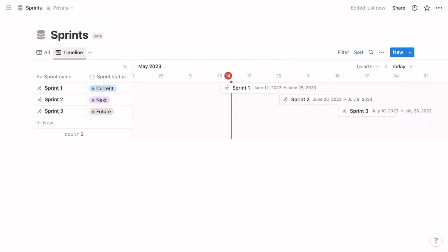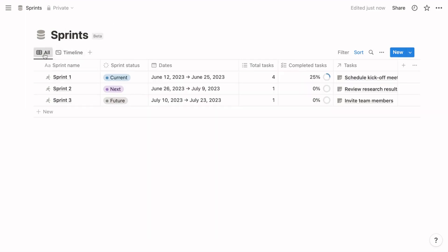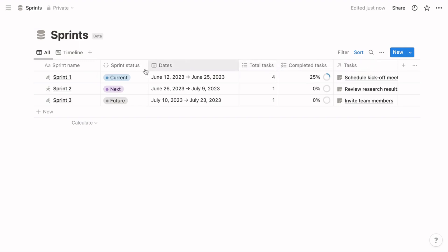Like projects, sprints form a parent-child relationship with tasks. The tasks property within the sprints database is a relation property. That enables the total tasks and completed tasks properties to perform their calculations—they're roll-up properties, which depend on relations. Total tasks counts the number of related tasks, and completed tasks displays the percentage of those tasks marked done.